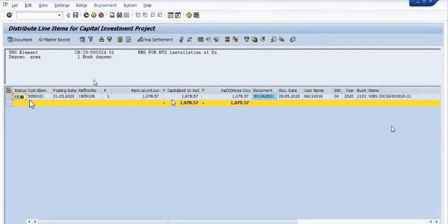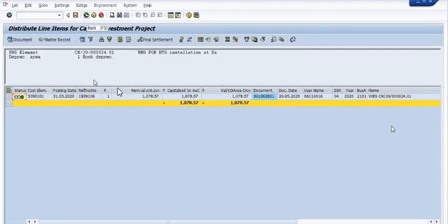Once you save, the green entry is showing here and the cost is successfully transferred. The WBS is successfully linked with this asset.